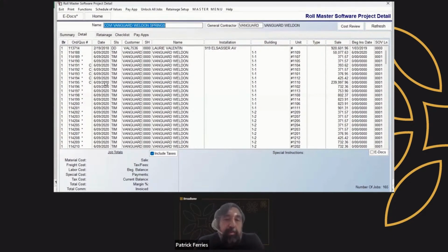That way I can issue POs to suppliers, bring in the material, and then I'll sort it out later how I'm going to divvy it up across the jobs. So that's an option you can do. There's not really anything different you're doing. It's just an option of setting up a job and calling it material holding and bringing everything in. That way later you can set up the rest of your jobs and phase out the job the way you want it to.